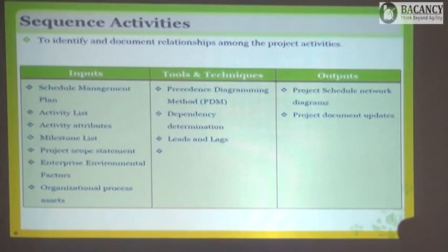But this is our construction: completing the plaster, and then wallpaper or coloring the wall. In between, you need to give it some time to dry up. Now drying is a process where you need not have any manual effort. For example, in your case, suppose you have to deploy some services at the customer side. You buy a server, you raise a PO, and you ask the vendor to deliver the server at the client side. Once it is delivered, only then will you go and start the installation process.